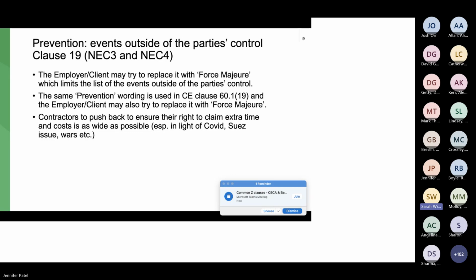And neither party was aware of it at the time of contracting. So this was only useful in that COVID period right at the start, for contracts that had been entered into before probably February or March 2020. After March 2020, when we went into the lockdowns, of course, when people were signing up to contracts, they were aware of COVID. So that's what it's about.